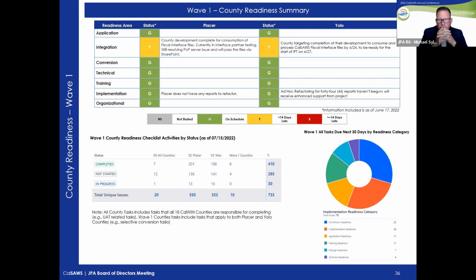Just from the legend, it looks like the colors in this particular area reflect the date to delivery. So if it's less than 14 days late, it's yellow. If it's equal to or over 14, it's red. What have we done about some of the quality issues and what they wanted to see, like on the change discussion guides, so that we can actually get acceptance and closure?